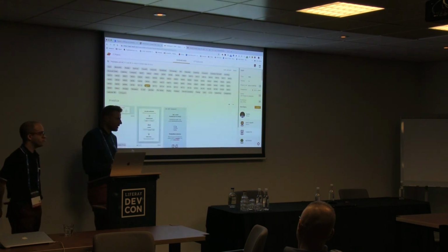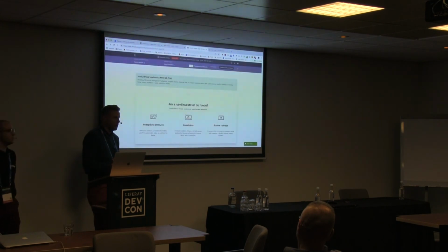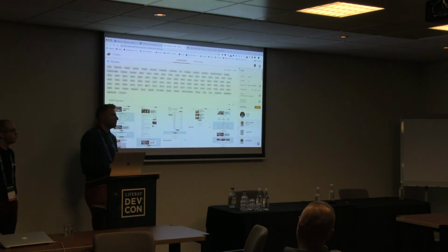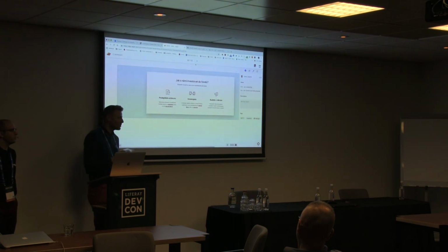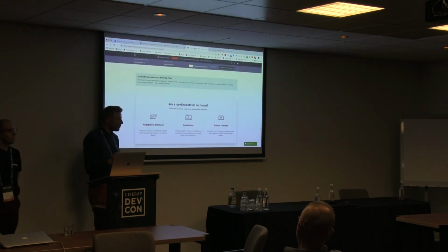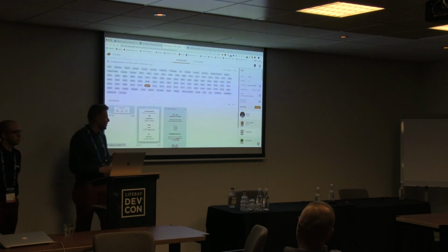We also changed the stand-ups because we were delivering everything through Scrum, and we got problems with the fixed 14-day sprints. So we changed to Kanban, and we brought all the teams together. So we got a stand-up of 20 people, but it helps a lot with the handover phase and bringing in the web content team. It saves us a lot of time, so we delivered it. It was kind of tough, but we managed it.